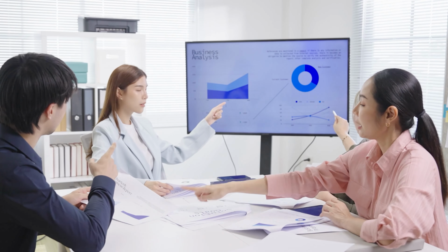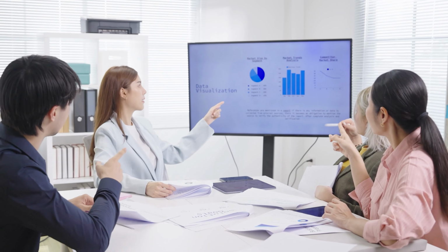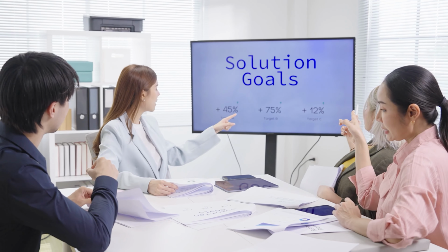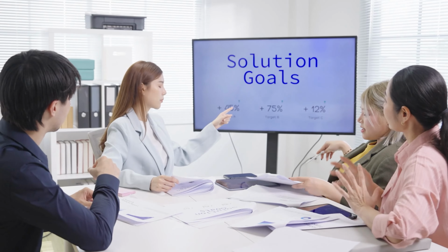No one does this. Well, most people don't do that, because most people just provide the headline of the ticket. They never plan their work, they don't have a backlog, and they don't plan iterations for three or four months. They just have enough work for the next week. This is a dangerous project; they can survive and work efficiently, but the testing there is very disturbing. Sometimes we have to spend more time on testing than on development, because we never described the feature at the ideation point, and we have to come up with edge cases and cover scenarios when the feature is considerably delivered.